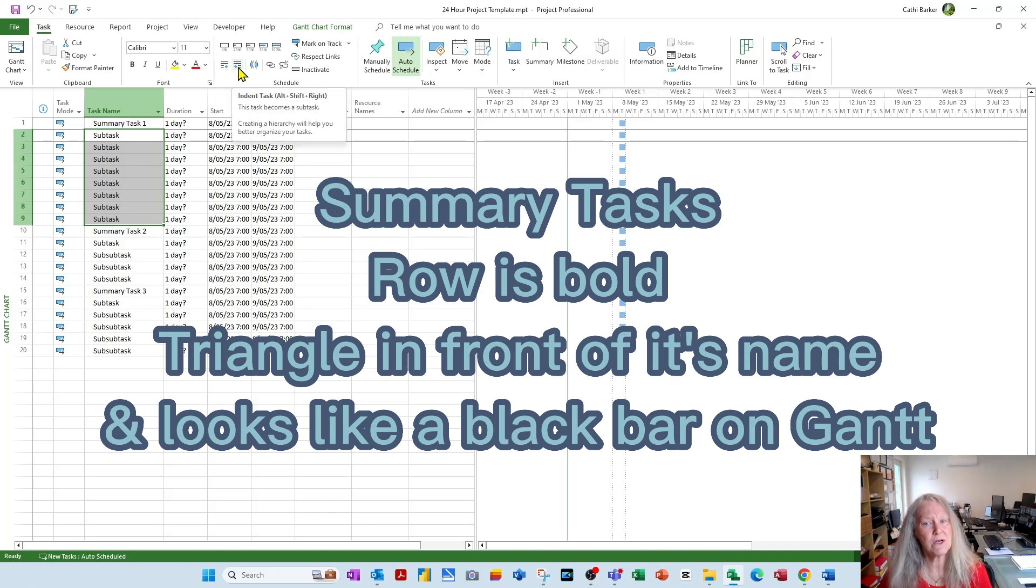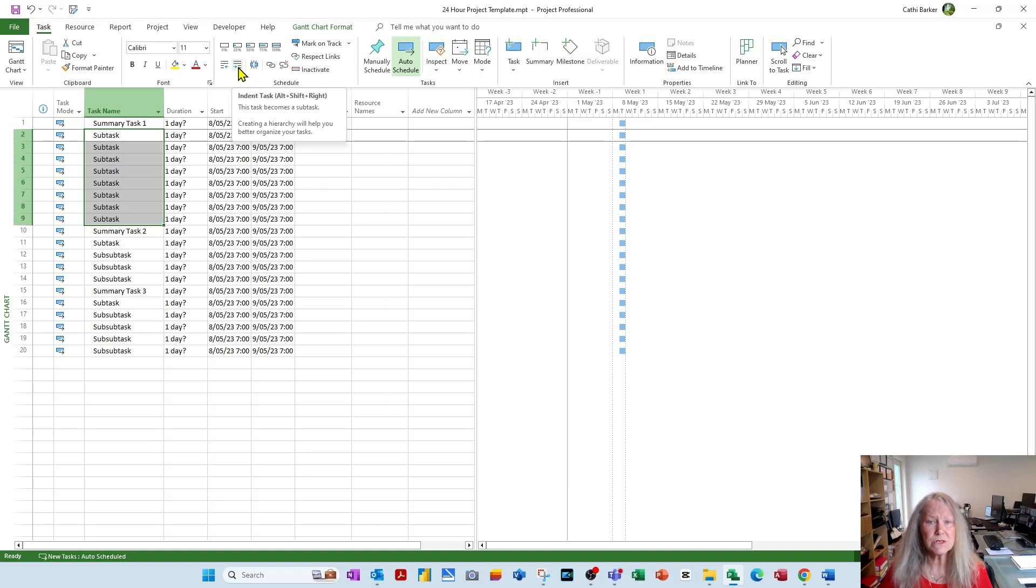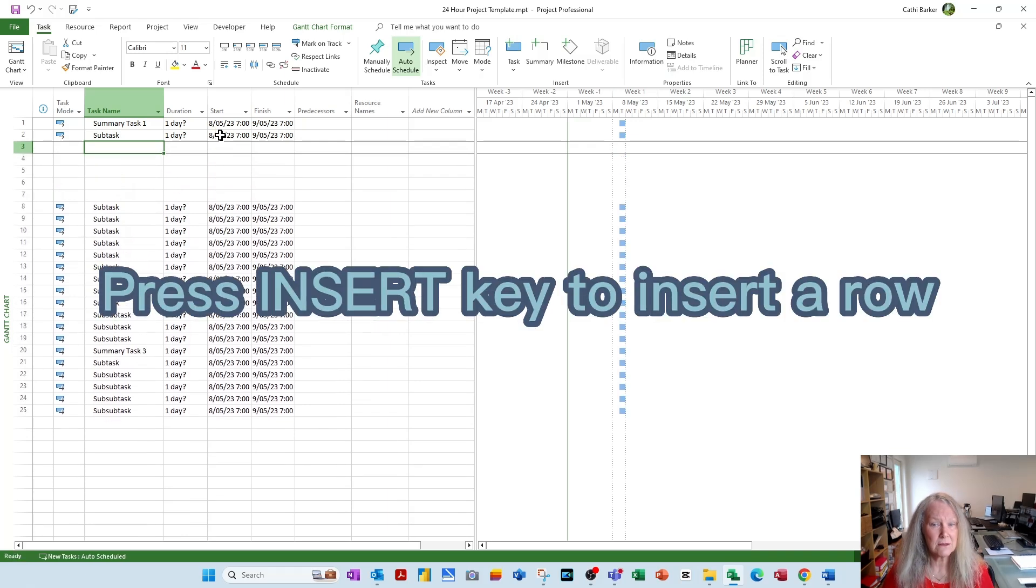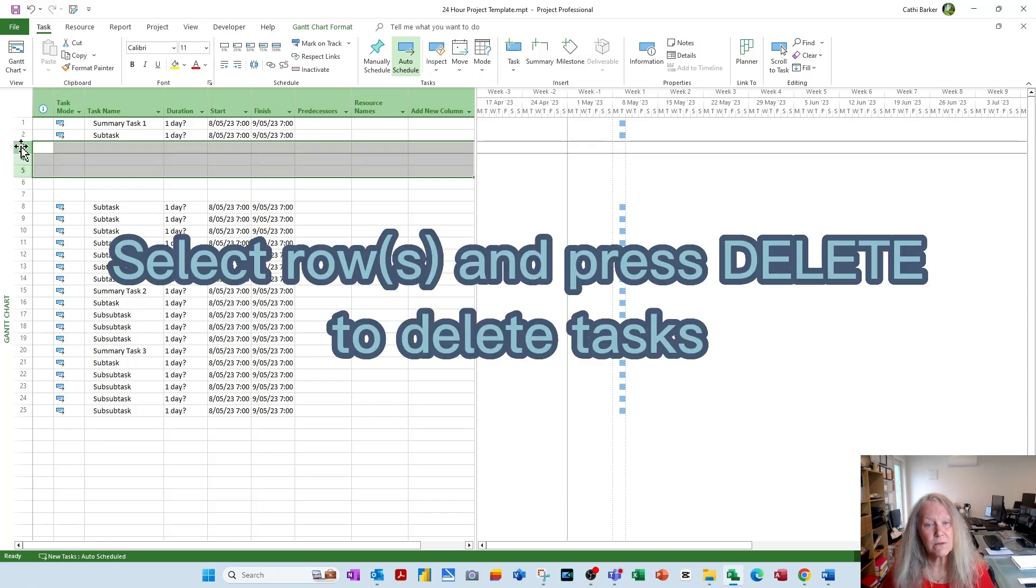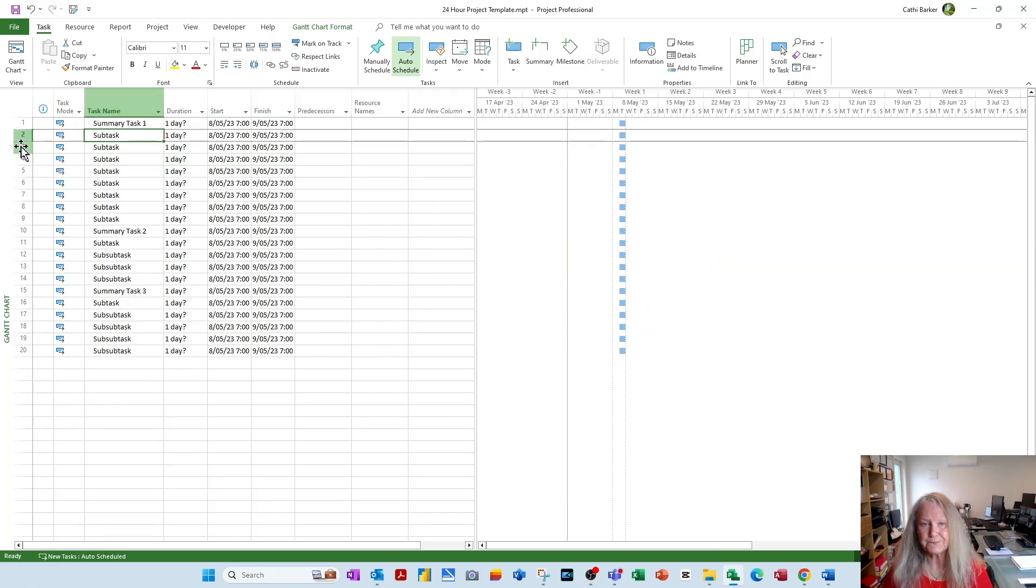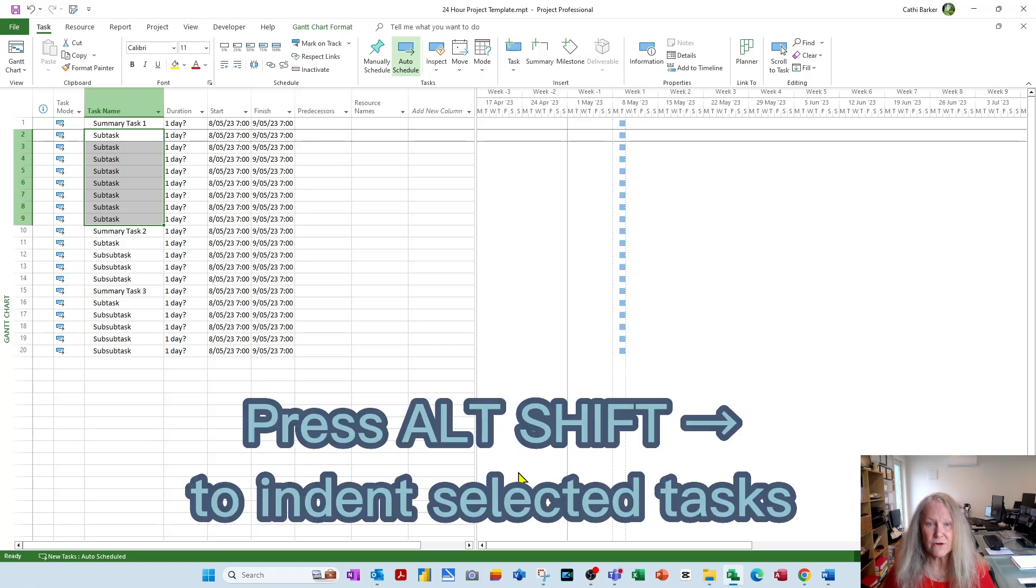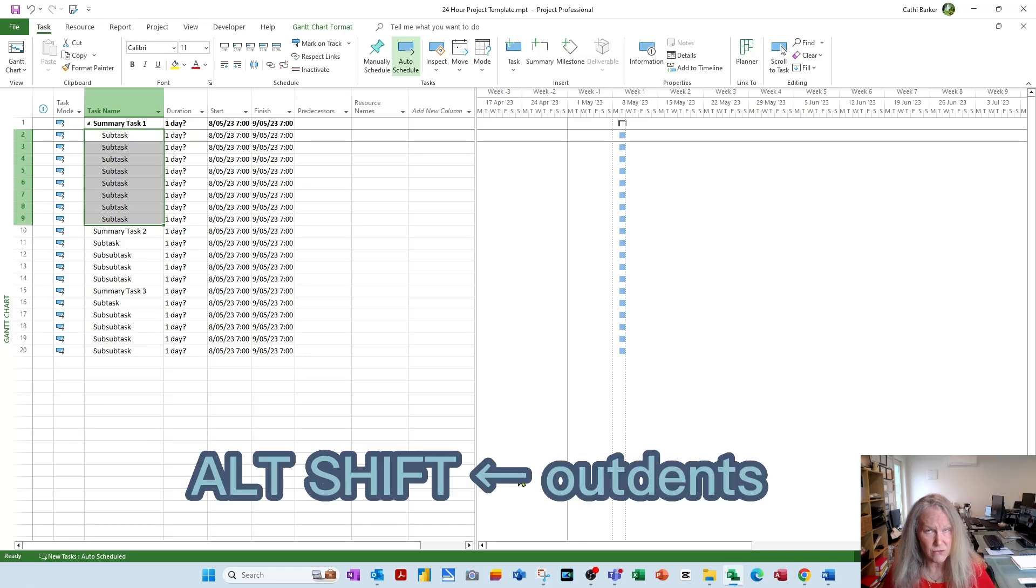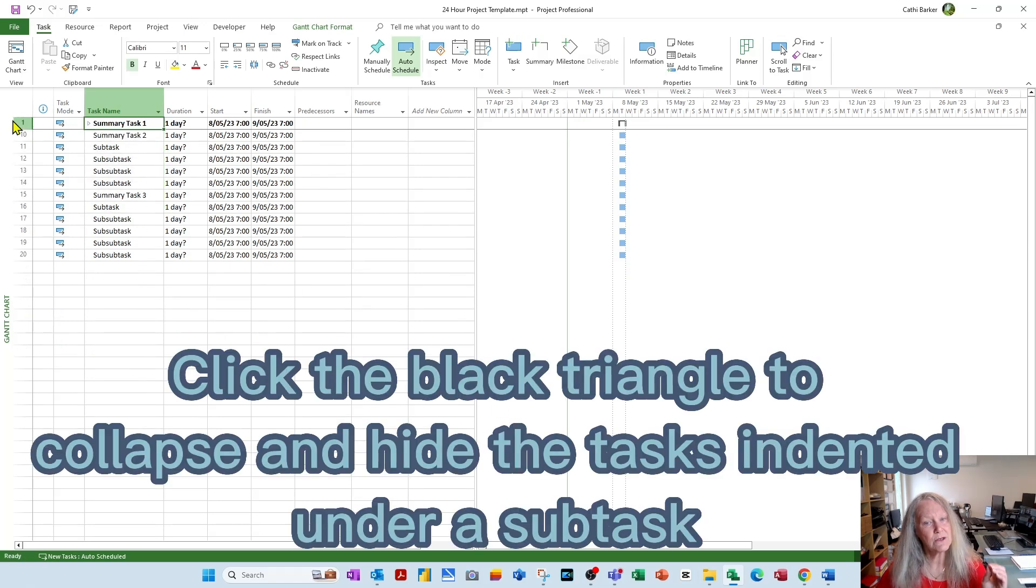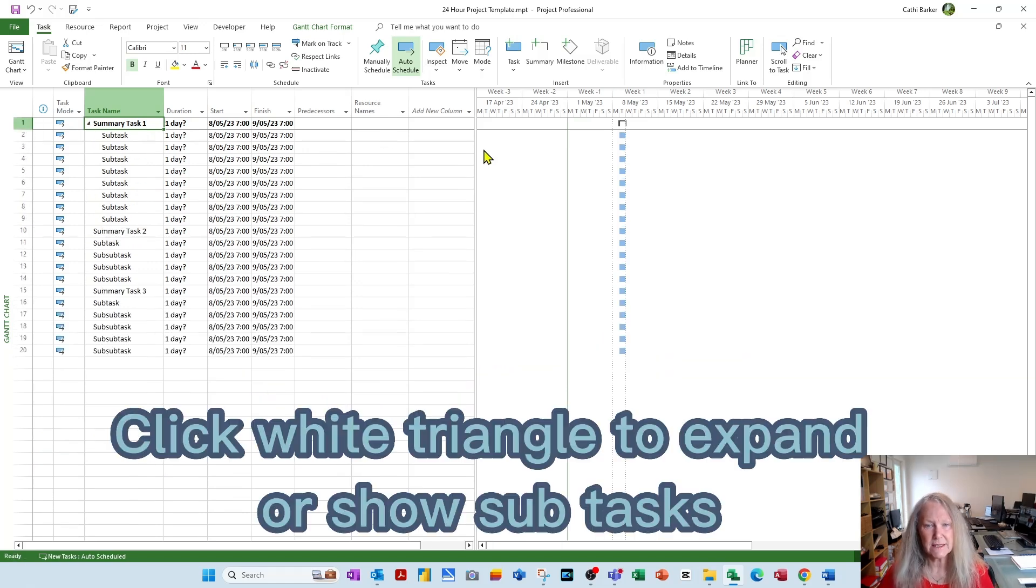So indent with this button, outdent with this button. But notice when you rest on them, there are shortcut keys. So if you work a lot in project, and spend a lot of time in project, you may want to start adopting some of the shortcut keys. And we learnt in an earlier video that pressing the Insert key is an easier way to insert a task. And Delete, if I select the entire row, is a quick way to delete one or more tasks. So I'm going to use the shortcut key to indent, which is Alt Shift Right Arrow. Alt Shift Right Arrow, indents. Alt Shift Left Arrow, outdents. So I'm going to indent these tasks, which means that I can now collapse rows 2 to 9, and it immediately goes from Row 1 to 10. So I collapse the amount of detail I'm seeing, and I can expand it again.